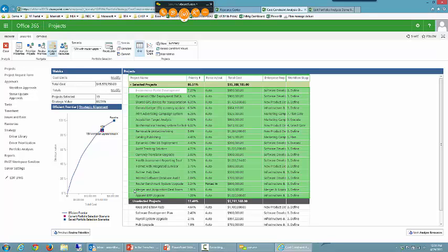If I never ran the project through the portfolio selection process and committed it, then it's probably not a good idea to move this project from the planning phase into the execution phase. We haven't determined if we're actually going to be able to do this project. So when you hit that commit button, it writes a bunch of fields.